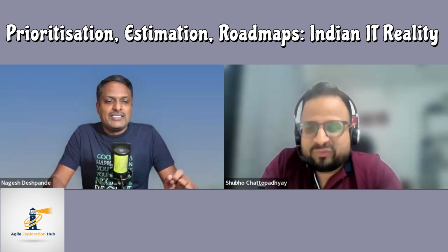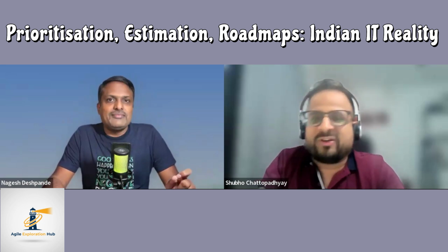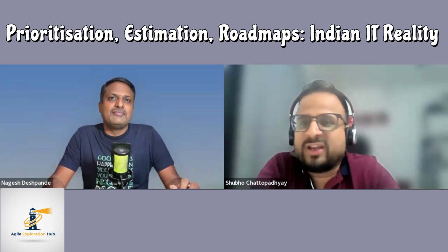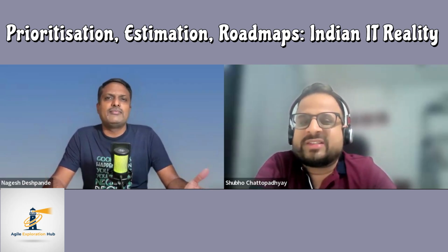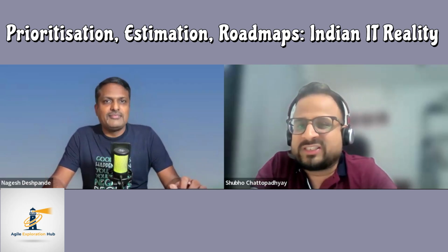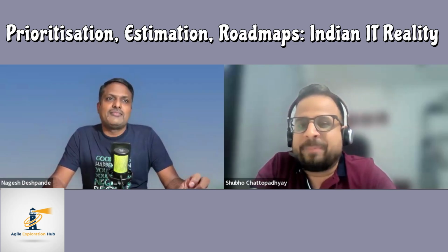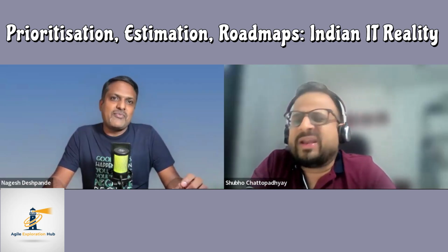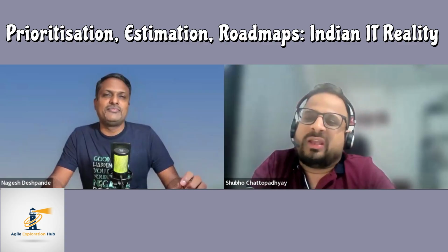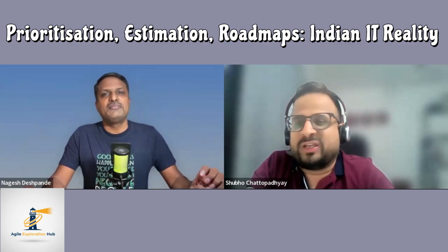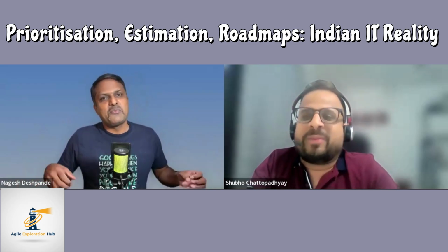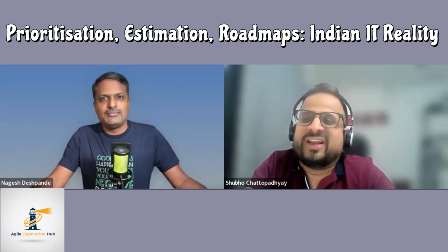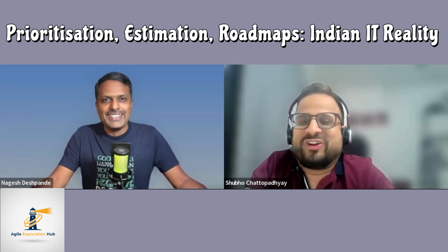You would remember there was a time when we used to be heavily involved in writing RFPs. And while writing RFPs, we are guilty of estimating considering the happy path. Or we predict things like, okay, 10% of the resources will take leave, and then you make an estimate. And what happens if 15% of your team takes leave in Diwali? Then what? Your entire estimates go for a toss, right?